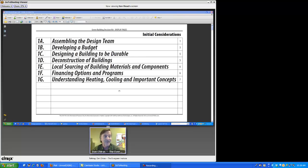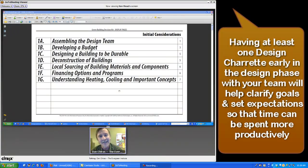So they'll have James design the home, and then when the home's done, they keep adding and adding, so the house gets even bigger than 6,000 or 7,000 square feet. And finally, when it's all done, they take it to a builder, and the builder prices it out at $1.2 million, and then they come screaming at us like, "Why didn't you warn us?" So it's really important to be very, very realistic about budget.